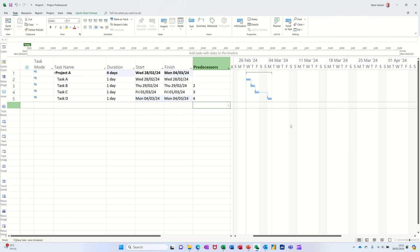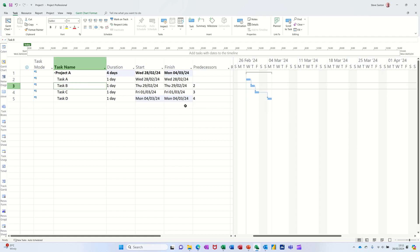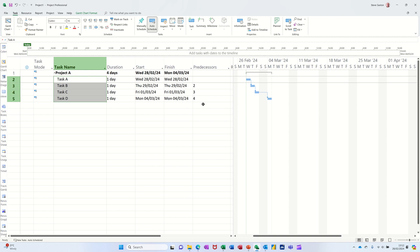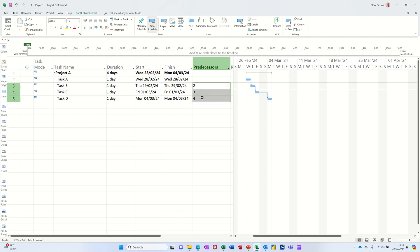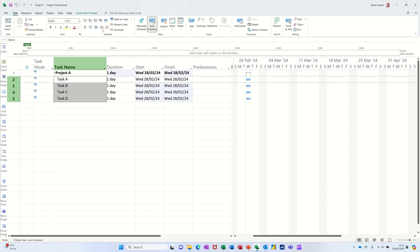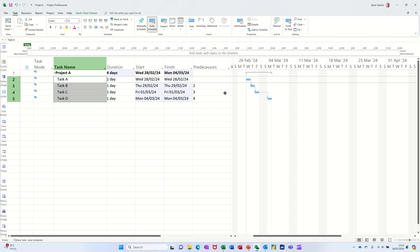Gantt is just the name of a bloke who allegedly invented this form of display. Now they're all following on. I could have highlighted those four — if they're all follow-on ones — and clicked on this little chain link at the top and it would repeat the process. If they're all sequential, you can click on that little chain link and it'll do it for you.